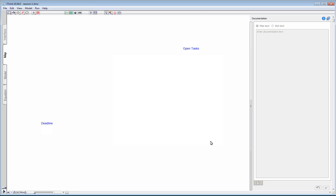Let's get back to our project management problem and start with the project's deadline. The first question we need to answer is, what influences the deadline? For our simple model, we assume the deadline is set from the outside and does not change. Therefore the deadline is a constant and does not have any influencing factors. In systems thinking parlance, we say the deadline is at the system's boundary.